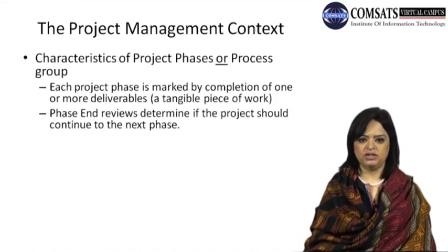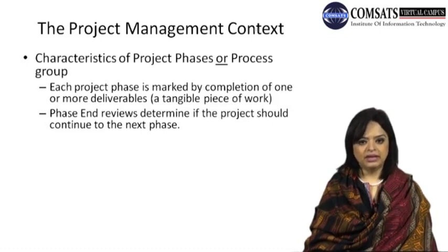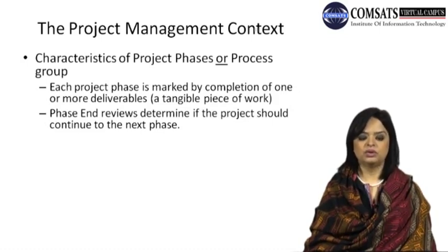So each project phase should have a document that can be signed, so the project manager is given the authority to move on to the next phase of the project. The phase end review: for every particular phase, there should be a phase end review which determines if the project should continue to the next phase.